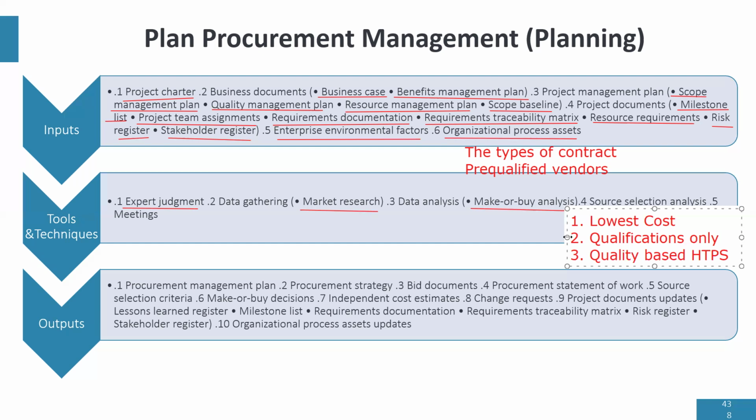And your scoring is any company that has had 8 years, you give them the full 10 over 10. The one that has 7, you give them maybe 7 over 10, and the one that has 3, you give them 5. So you must create a scoring system because you are going to choose the company that ranks the highest in terms of quality.